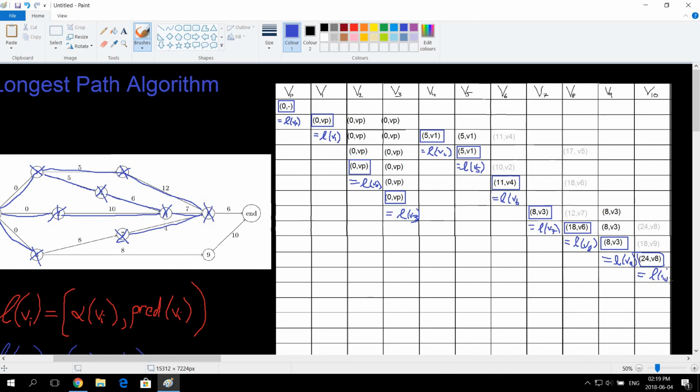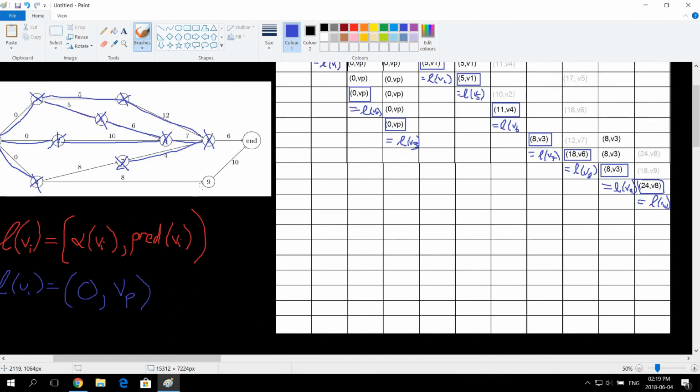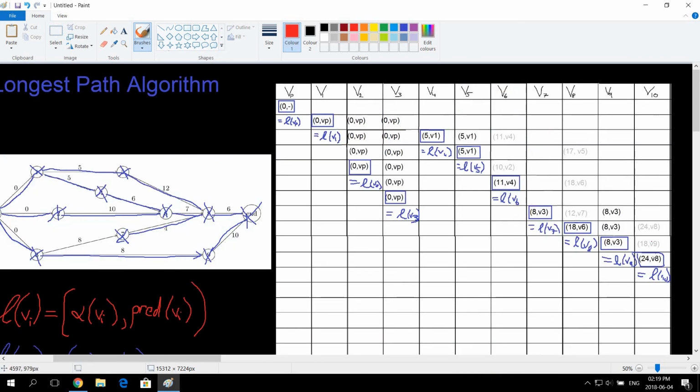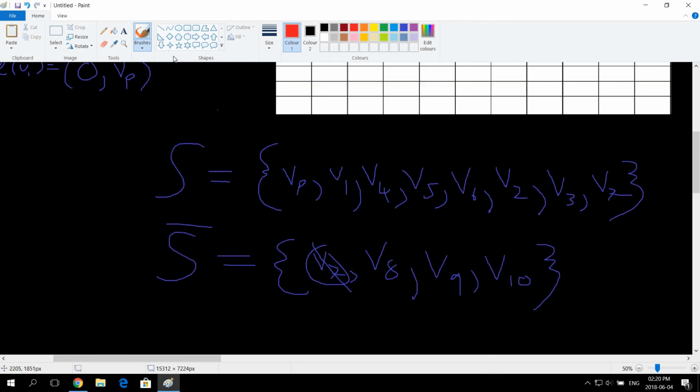So this is what you're going to have to do once you've got this. Once you've got all of these blue blocks and you've ticked them all, and you've completed all the correct paths to get your longest path, I'm actually going to write that one in red. So now this is the highest number. So this is the critical path.